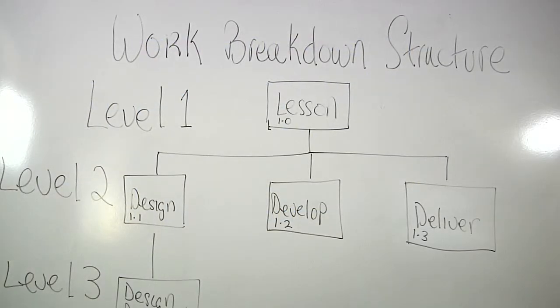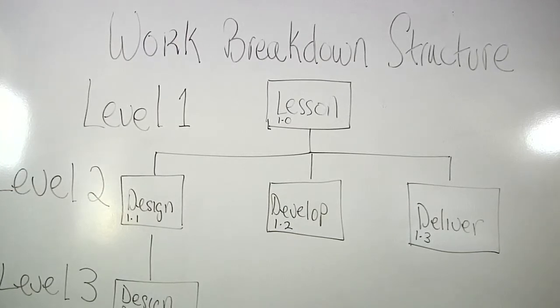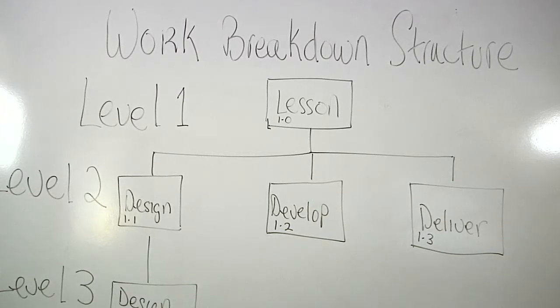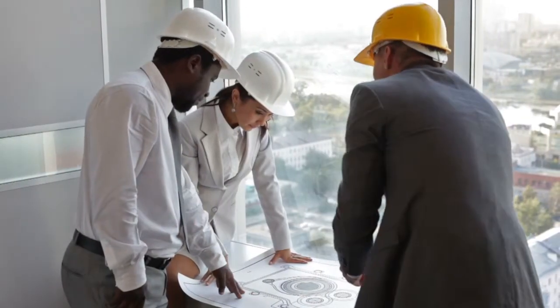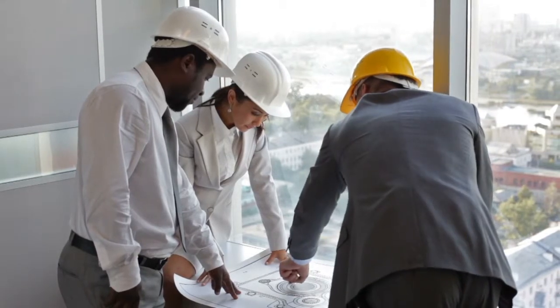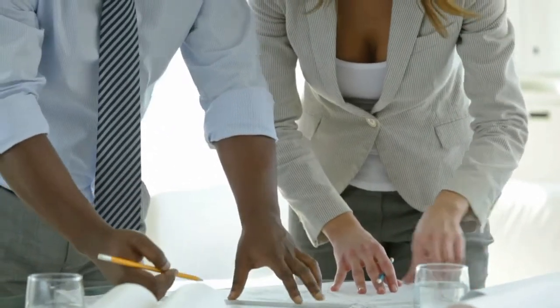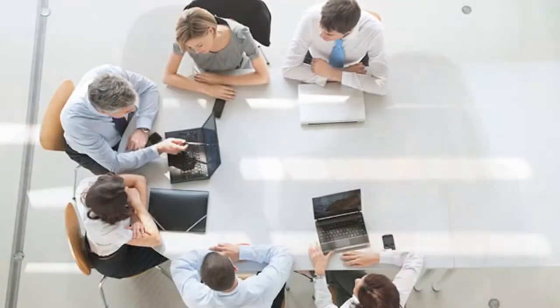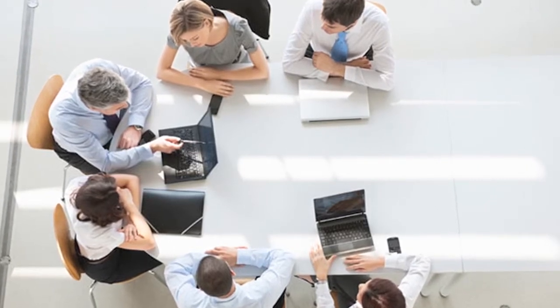Do you remember the 100% rule that states that collectively all levels of the work breakdown structure roll up to the top so that all project work is captured and no additional work is added? Any modifications to the agreed upon work breakdown structure is considered a scope change. This means that adding or deleting activities or any modifications to the existing activities on the work breakdown structure constitutes a project scope change. Changes in product scope require changes to the project scope as well.